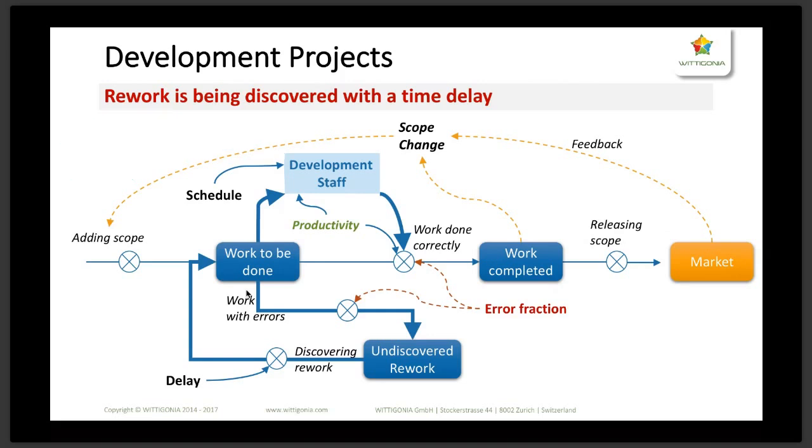And here is the last implication that I want to cover today before we go into some simulations, and that is about the resource availability. Now, when we talk specifically about transformation projects, transformation by the nature of the definition means that you have some kind of a business model or an existing company or organization, and you're trying to accomplish something with the existing organization. So turning that, for example, from a pure service-oriented business into a product-oriented or platform-oriented business. And what most companies then choose to do is they take the senior resources, or sometimes only the just available resources, which are not utilized, and they are drawing from this resource pool in order to staff the development projects.